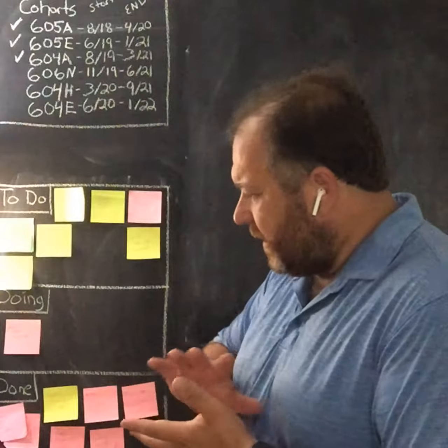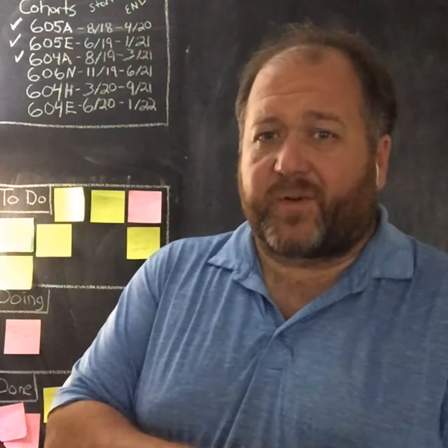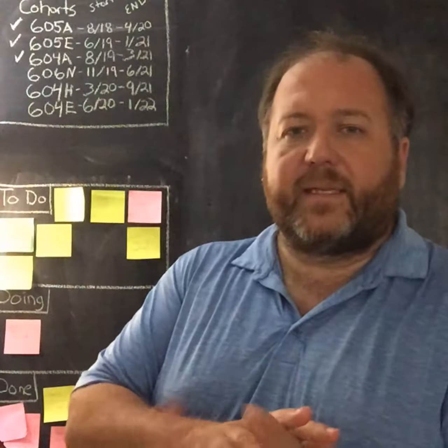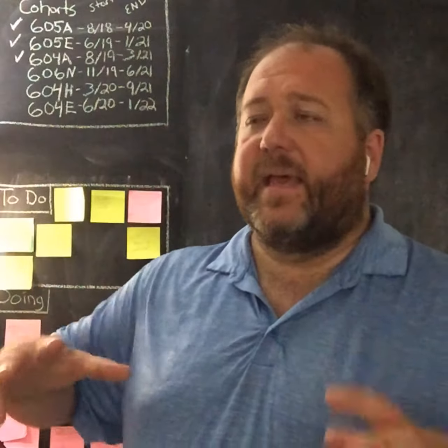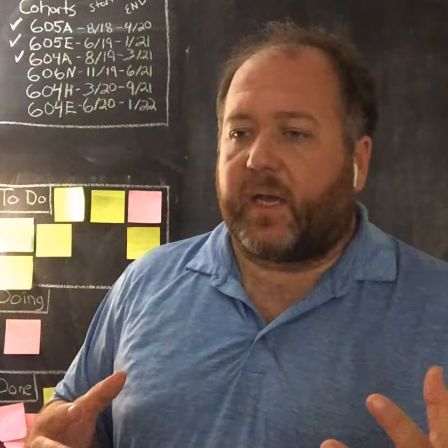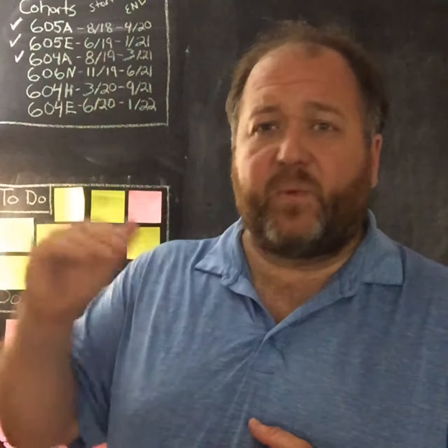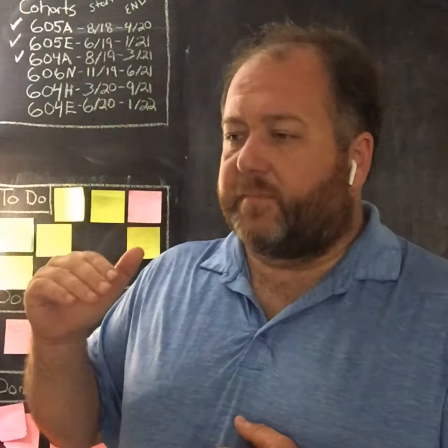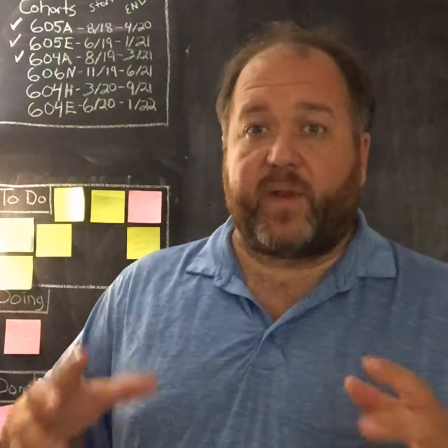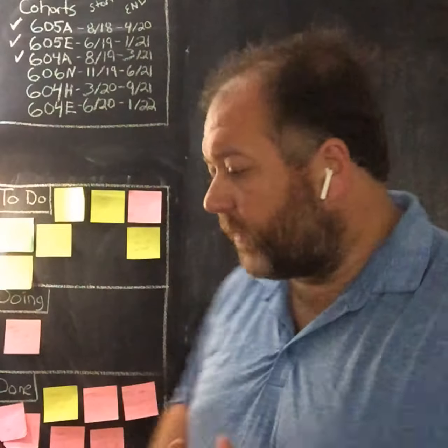The next section of the project scope document is the acceptance criteria. What level do you need to get to when this project is done, completed, and acceptable? The last thing you want is for that bar to be raised midway through a project. So having the success criteria agreed upon before any work starts, hugely, hugely important.